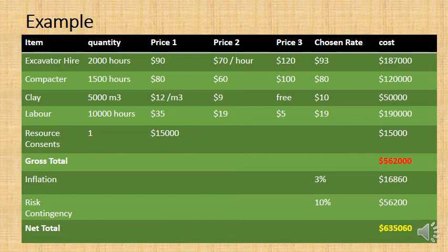And the real big risk I foresee with estimating using an itemized estimate is you will forget certain key items. You will not include the prices for these in the estimate. And when you're building the project, you realize, we need to do this. And you spend money that was not budgeted for. It was not included in the estimate. And that can be a big problem. And so that's one of the big risks.